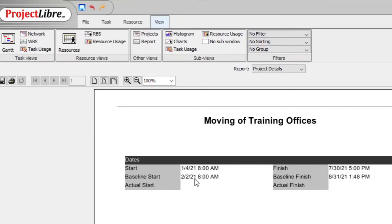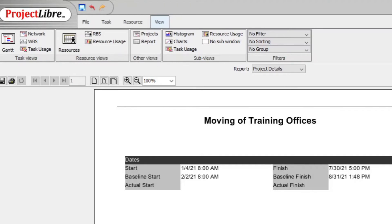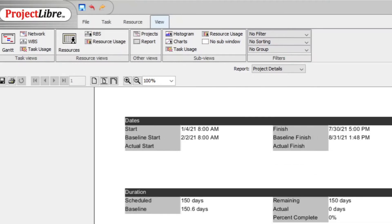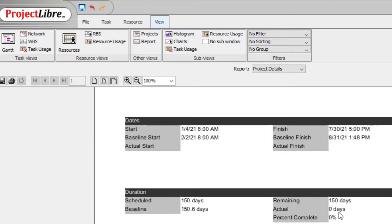And this shows you that you have a baseline, baseline start, baseline finish, but at the baseline, there's nothing actually done. And this is what you want because you made a mistake then. So if this is zero, you know you have reset your baseline and established a new one.